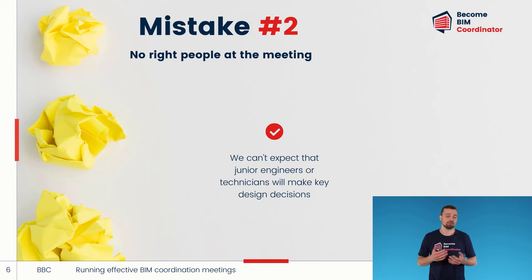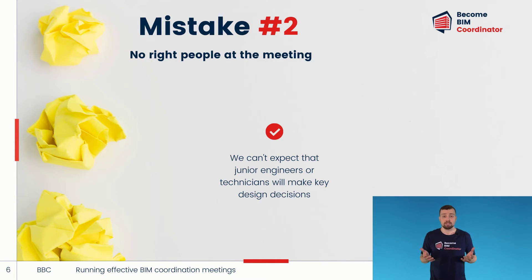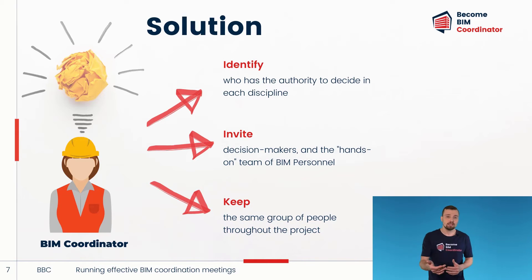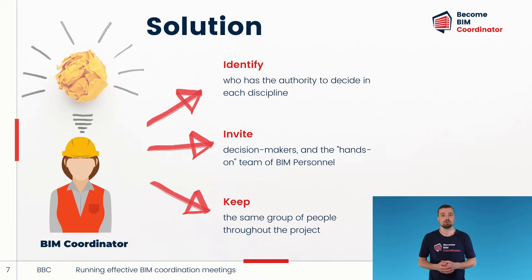The next mistake is not inviting the right people to the meeting. Who are the right people? The answer is those who have the authority to make decisions. During a meeting, when we need to make important decisions about system redesigns, we can't expect technicians or junior engineers to make such key decisions — they don't have the authority. A BIM coordinator will need to identify who the decision-makers are from each discipline. This can vary depending on the type and stage of the project and what issues will be discussed at the meeting.